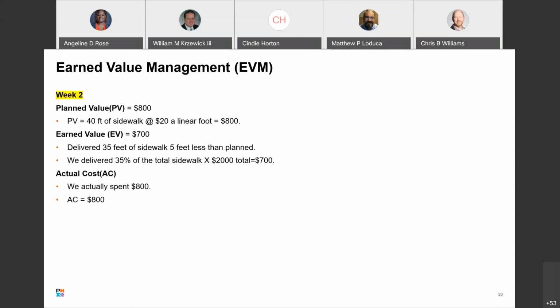So planned value 800, earned value came in short at 700. What do we actually spend? We spent $800, right? So our AC, our actual cost, is $800. So the only thing that's out of whack on here is earned value. What we delivered, we came up short, but we still had to pay everybody to be there. For whatever reason, we just weren't as efficient. We came up short.